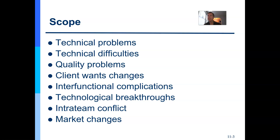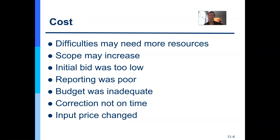Back to the Isilon Hadoop issue and needing to change drives — there are inter-functional complications that just will happen. That's why when I deploy something in an IT environment like antivirus, I don't just roll it out to everything. I do the endpoints first, like desktops, then approach virtual machines, learning lessons as I go so that when I get to critical servers, I have a good idea of the direction and the risks involved.